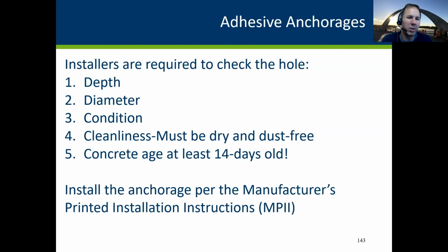And then the concrete age, we want that concrete to be at least 14 days old. It happens as concrete takes a long time to hydrate and use all the moisture. And so we found that adhesives do not like concrete that still has moisture in it.